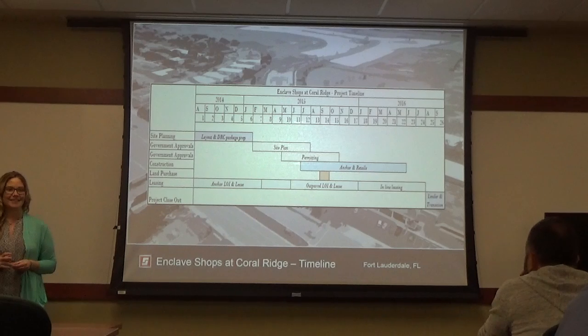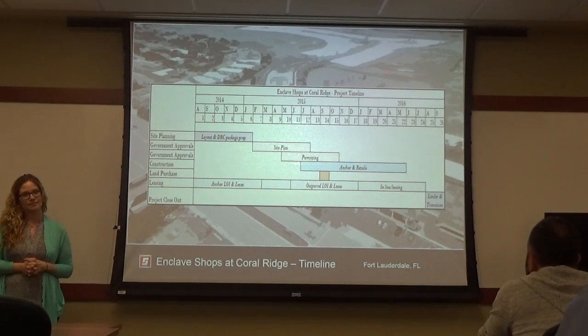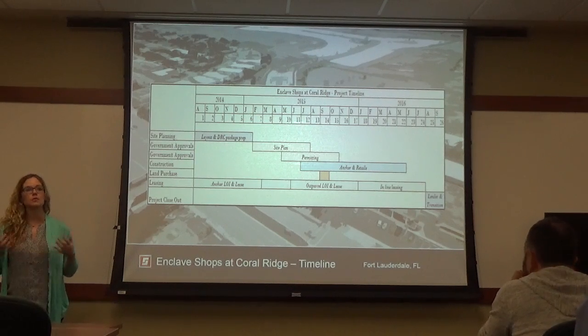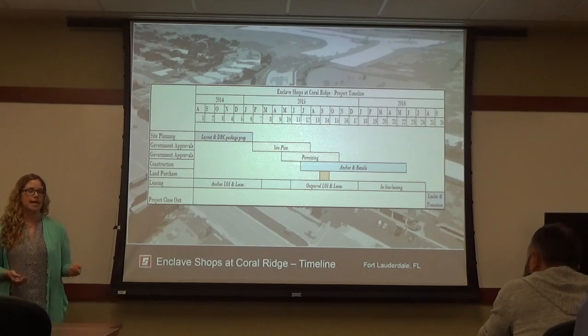You're shaking your head, maybe you've been through it before. I had a client building a luxury condo, and he refinanced, so we had to get all our contracts and final them out and issue new contracts because you can't have any liens, so you've got to close out your notice of commencements. We closed out all of our notice of commencements, and logistically it was a paperwork nightmare, but on top of that you really do technically have to stop construction for 1 day, and it has to be the same day that you close.